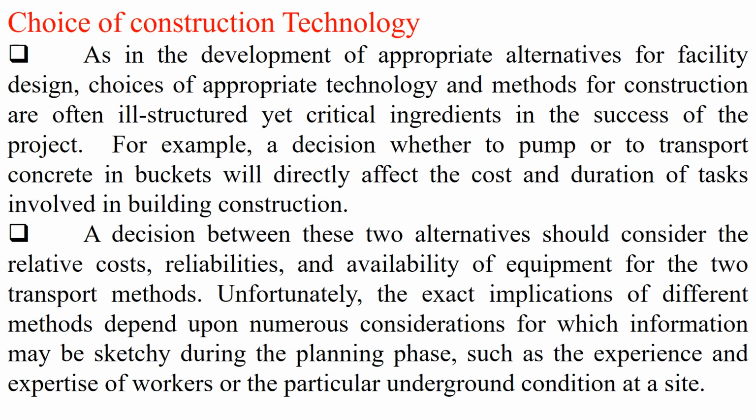Decision between these 2 alternatives should consider the relative cost, reliabilities and availability of the equipment for the 2 transport methods. Unfortunately, the exact implications of different methods depend upon numerous considerations, for which information may be sketchy during the planning phase, such as the experience and expertise of workers or the particular underground condition at a site. So looking towards the various conditions, available properties and the geometrical features of the site, the decision making capabilities, even the thought process, may change by site.